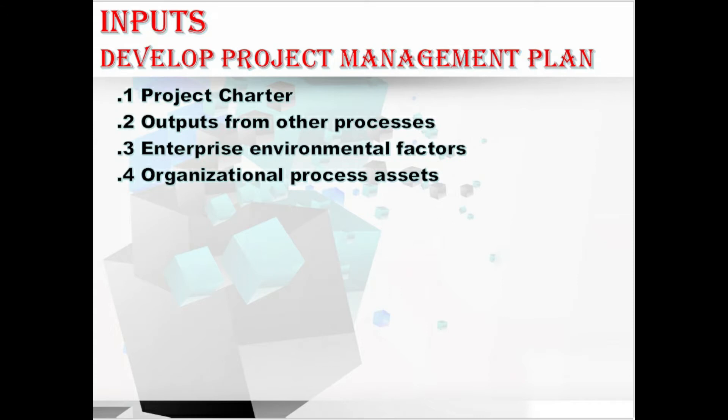We have outputs from the other processes. Outputs from many of the other processes are integrated to create this project management plan, and these subsidiary plans and baselines that are an output from the other planning processes are also considered inputs to this process. Hope you understood this input. Let's move to the next input.